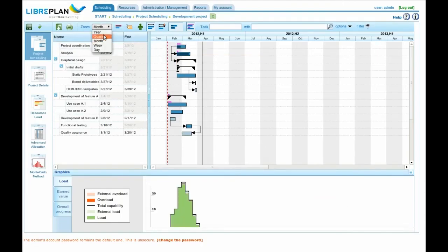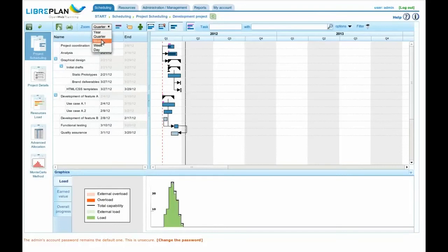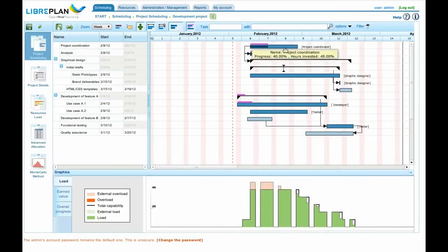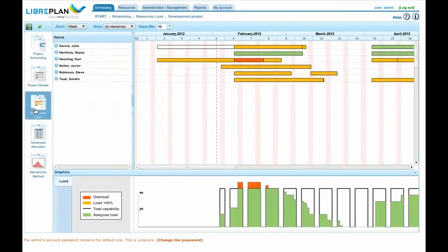This shows in real time what will happen when we plan projects and if we are allocating our resources in an efficient manner. For instance, if we move the task assigned to workers matching the project coordination criteria, we see that we can keep our deadlines while reducing the resource overload, and so the possibility occurs of adding extra hours to anticipate deviations.